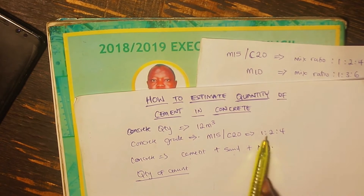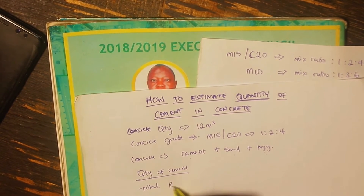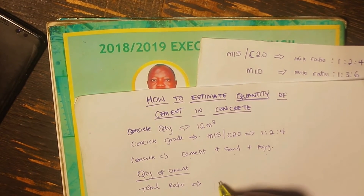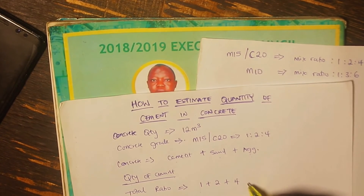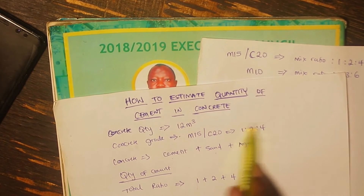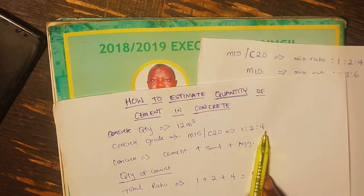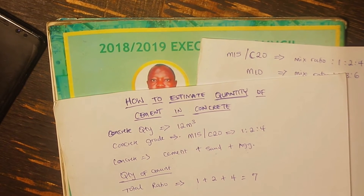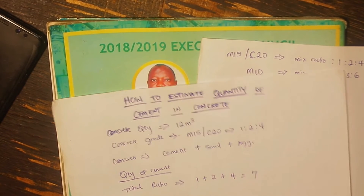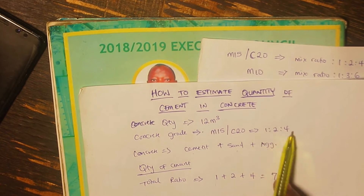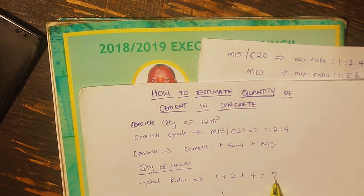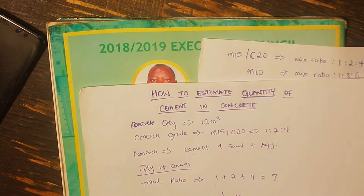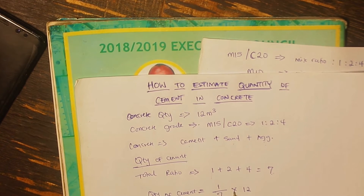To get the quantity of cement, I need to first deal with the proportion. So I'm going to calculate the total ratio. The ratio is 1:2:4, so it's going to be 1 plus 2 plus 4, and the total ratio is equal to 7. From this ratio, the first number represents cement, the second represents sand, and the last one represents aggregate. What we are looking at is the quantity of cement, so I'm going to be dealing with 1. The quantity of cement is going to be equal to 1 out of 7 — because the total ratio is 7 — multiplied by the total quantity of concrete, which is 12 cubic meters. That will give me the quantity of cement, but that will be the quantity of dry cement.